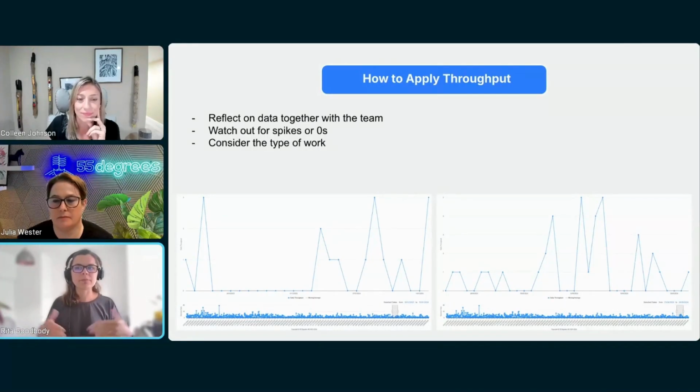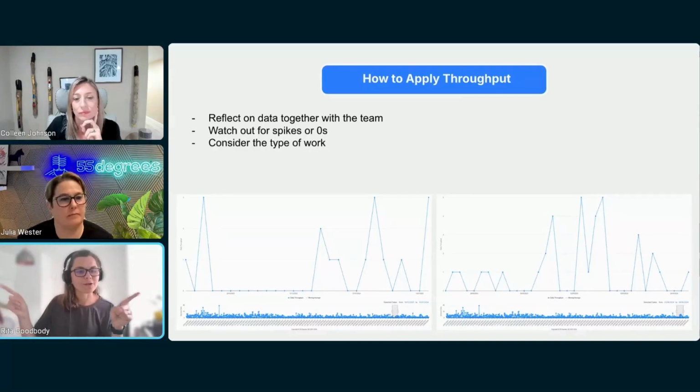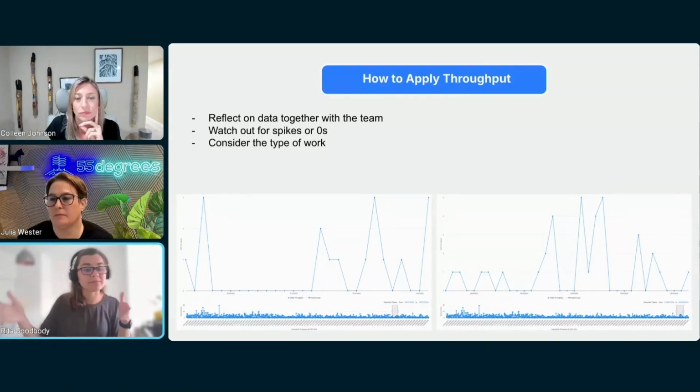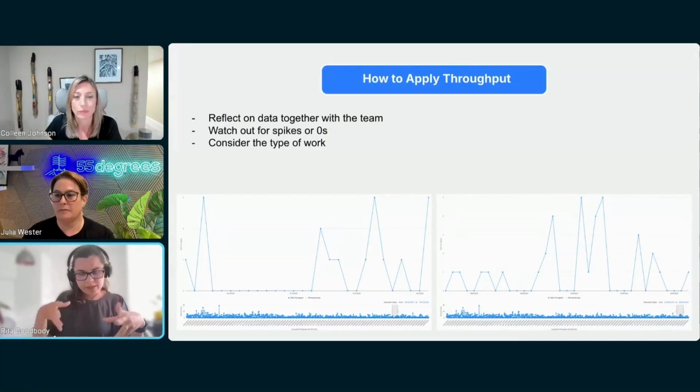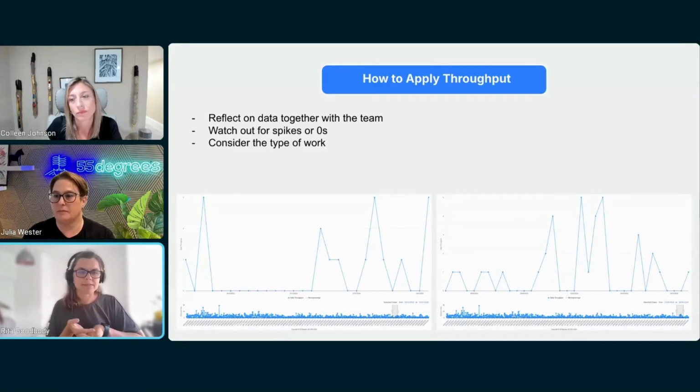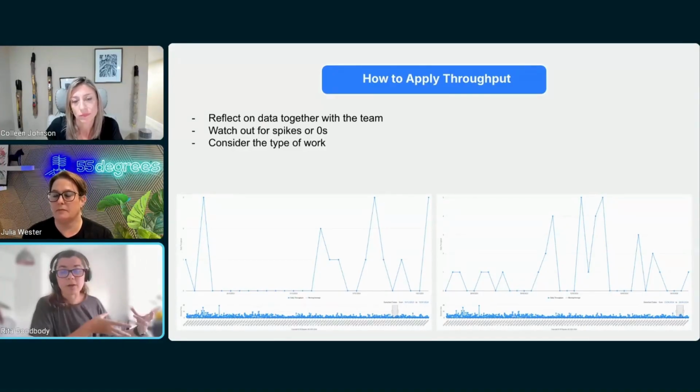And extremely important is, there isn't a right amount of data that each team needs to look at. Is it 8 weeks, is it 12 weeks, is it the last 10 data points? The most important thing is to think about your experience, and if you have team days, if you are traveling on a regular basis, if you say, oh, this is our holiday season because that's when we are all off.